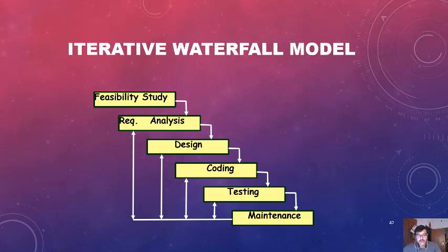It is not possible to strictly follow the classical waterfall model. Feedback paths are needed from every phase to its preceding phase, to allow for the correction of errors committed during a phase that are detected in a later phase. The effort on a phase may require some rework later due to errors in that phase which were detected in later phases. This necessitates rework in already completed phases.